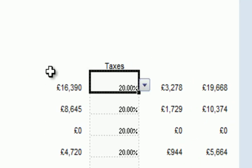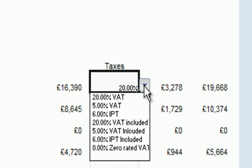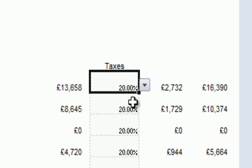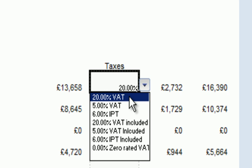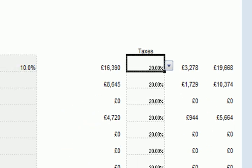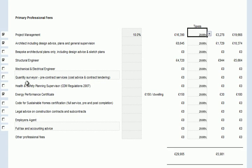Similarly, if the quote we've obtained includes VAT, we have a choice here of ticking through the options and changing the VAT treatment. Let's leave it as cost plus VAT. VAT is very important in terms of developing residential property because most of these costs are services and as an individual developer you won't be able to recover them — they are additional costs. However, if you're a VAT-registered developer then you potentially would be able to recover these costs, which is why it's important to make reference to VAT.